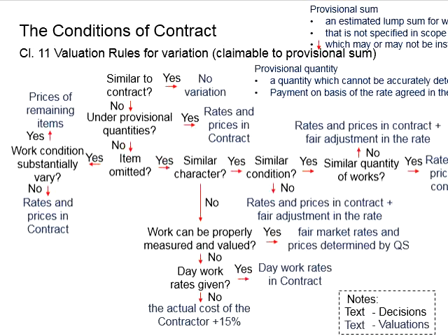The relevant work can be said to be not official during the stage of the tendering; the employer hasn't decided whether the works will be incorporated or not in the actual work later. Knowing the existence of this kind of work, normally the contractor will have to estimate a sum based on their previous experience to be incorporated in the lump sum for that particular work. Simply said, the relevant cost has already been estimated within the lump sum of the contract.